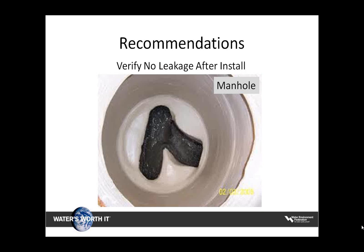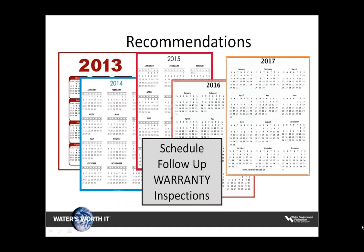It's also recommended that products get a follow-up warranty inspection. This is critical in determining if the correct product was chosen the first time and if it was money well spent. More and more contractors are increasing their warranty based on the fact that the inspector or the city does not have the resources to conduct follow-up inspections. It is the single most important thing that will ensure the product is doing its job over a long period of time.